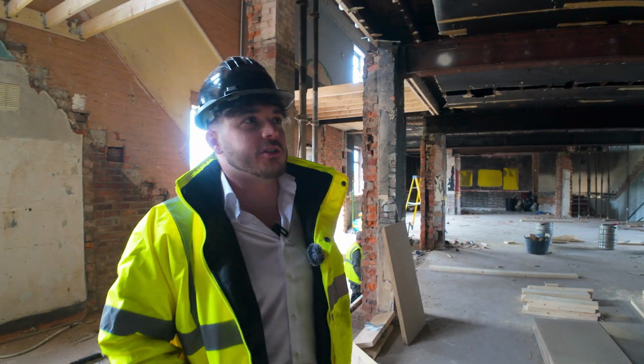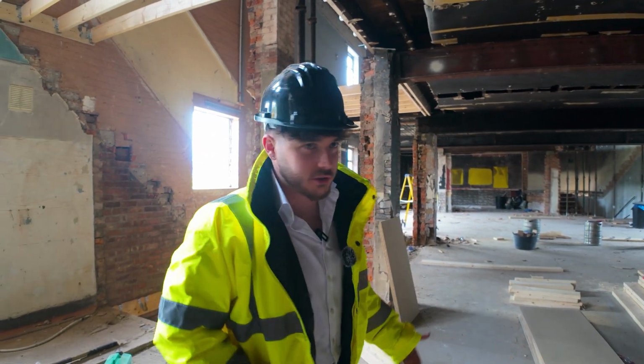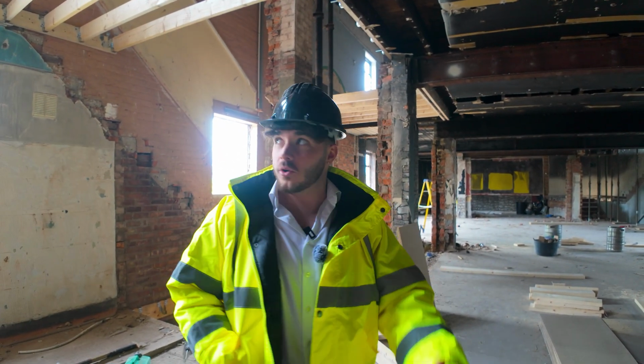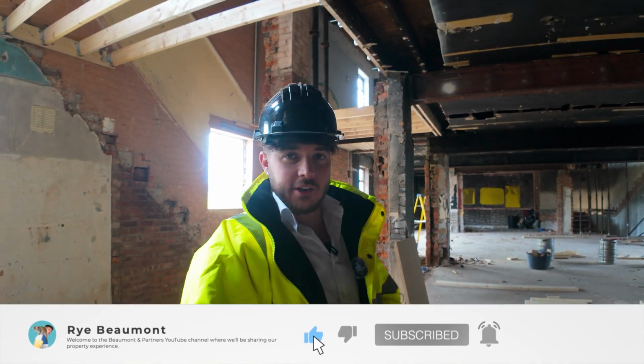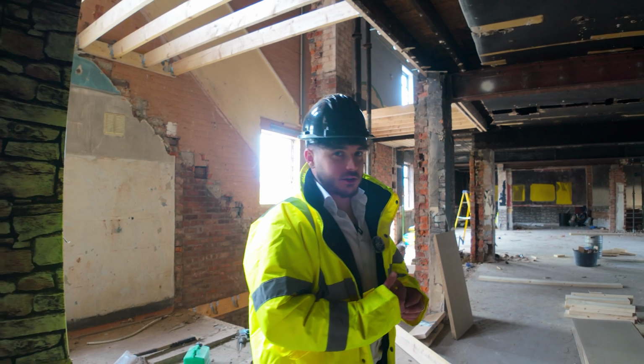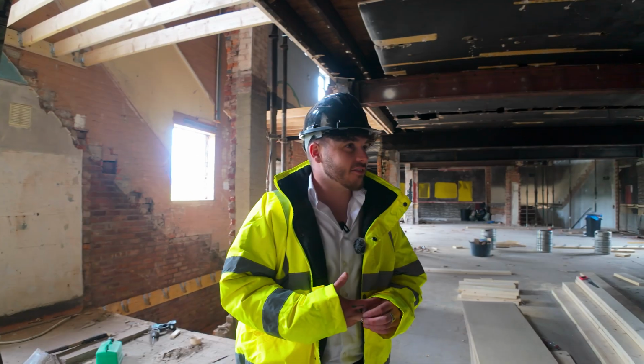And then you go back to structural engineering and go, we need a new temporary supports design, or we need a new design to put in a new floor. Now we've got to buy all of these extra joists. All these kind of things happen when you take on these bigger sites, which is why we have contingency on the enabling works and the structural. But great, back to brick. Love it, love it, love it.